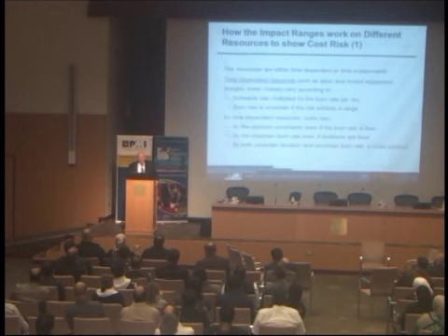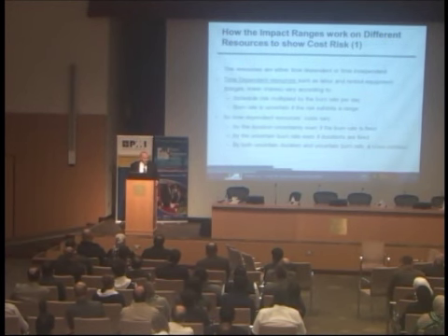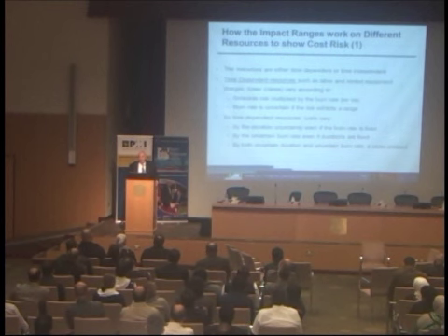The cost guys would come in and look at the schedule and take maybe 2 days to load it. This is at Petronas when I was just introducing the technique to them. I mean, they'd never done it before. Their cost guys never talked to the schedule guys. The cost and schedule were inconsistent with each other, because the schedule gets updated every month, while the cost estimate does not. The cost estimate does not reflect the impact of the schedule.